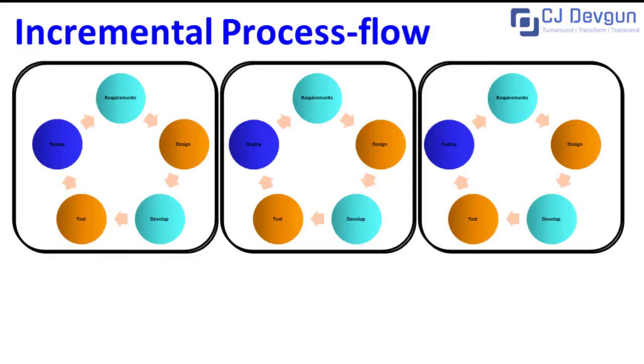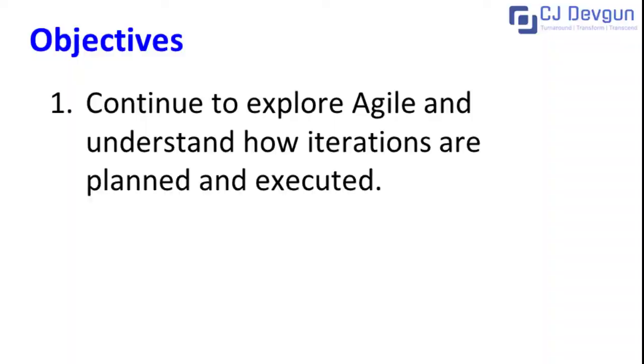Now, Agile, on the other hand, is an incremental approach to work. Here, you break requirements into smaller releases, where each release delivers the highest valued functionality. The key here is that you iteratively prioritize, design, and develop these functions. This gives you flexibility in case you need to pivot. But more importantly, you get your products in the hands of your users so you can validate your assumptions and create immediate value.